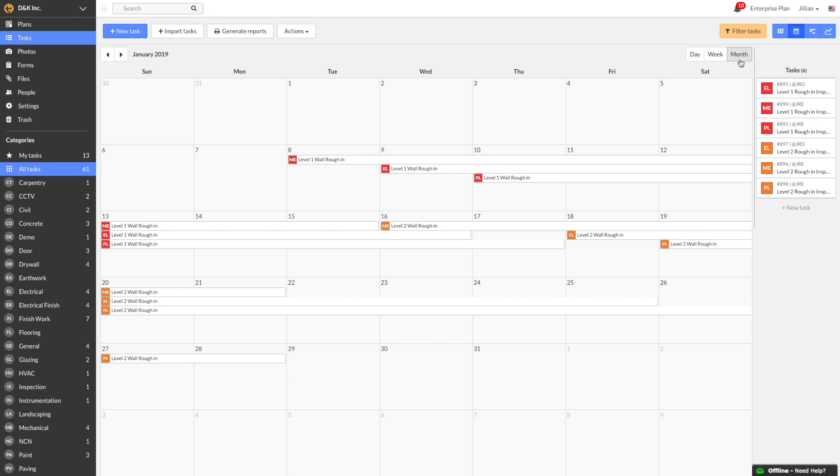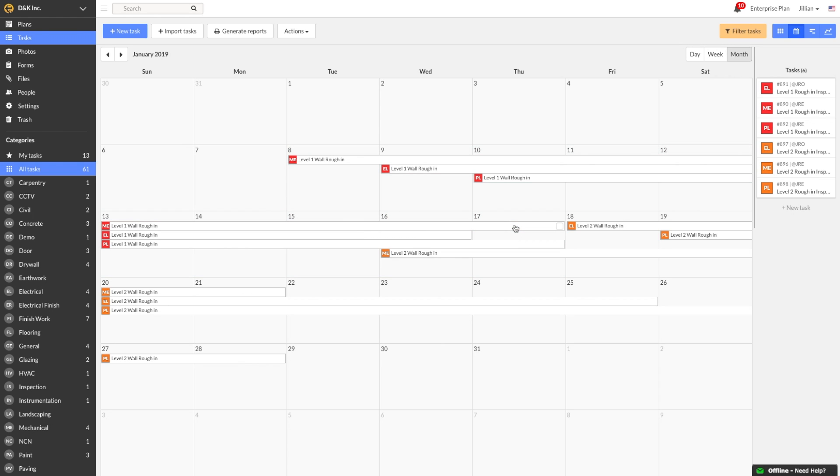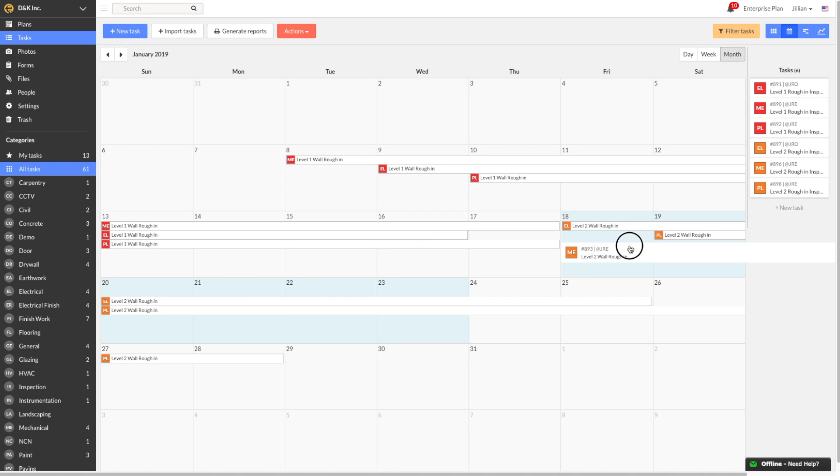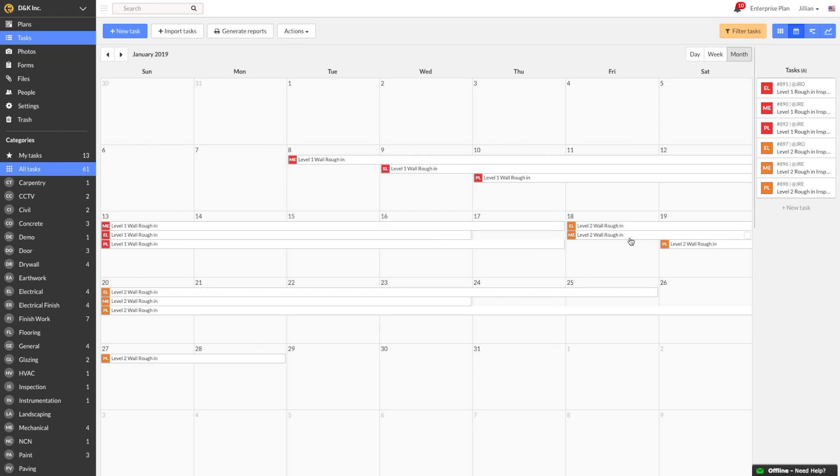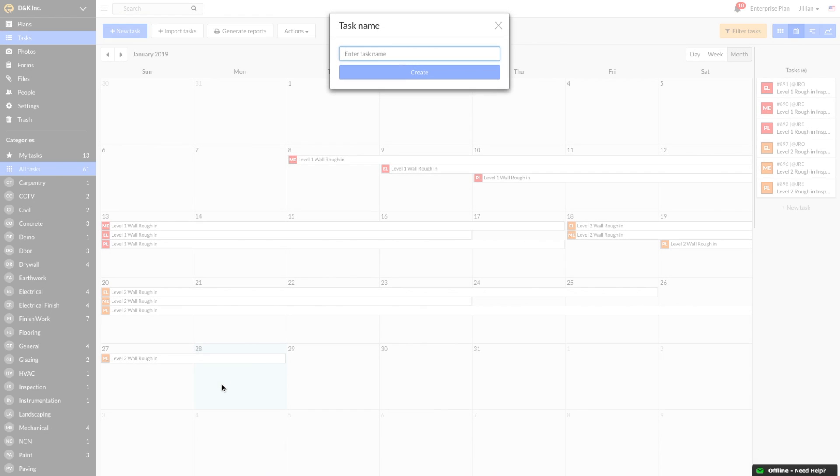I did just get an update from my Mechanical sub that they don't have the manpower to complete their rough-in for Level 1 by next Tuesday, so I'll quickly extend the end date by hovering over the end of the task and dragging to the right. Then, I'll select the second level rough-in task and move it out to start on a later date. Please keep in mind that tasks are not dependent on each other. I also just got an update from my Electrical sub that they are on schedule and can start Level 3 rough-in at the end of the month, so I'm going to add a task to the schedule by clicking on the calendar.